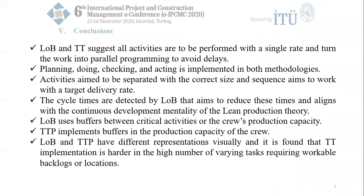As a conclusion, line of balance and takt time suggest all activities are to be performed with a single rate, turning work into parallel programming to avoid delays. Planning, doing, checking, and acting is implemented in both methodologies. Activities aim to be separated with the correct size and sequence to work with a target delivery rate. LOB detects and aims to reduce cycle times, aligning with the continuous development mentality of lean production theory. LOB uses buffers between critical activities or the crew's production capacity, while takt time planning implements buffers in the production capacity of the crew. LOB and takt time planning have different visual representations, and takt time implementation is found to be harder with a high number of varying tasks requiring workable backlogs or locations.